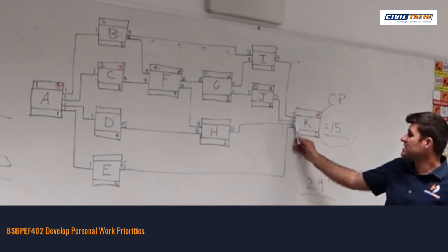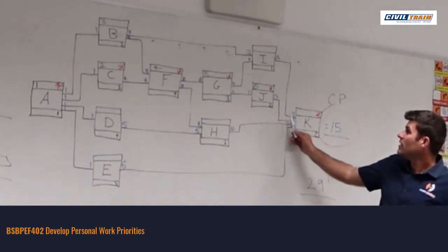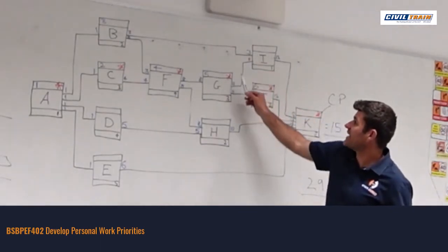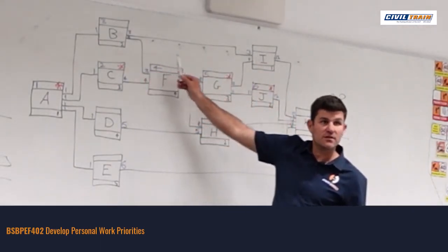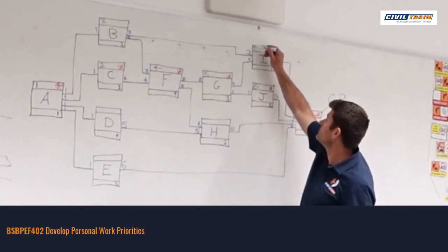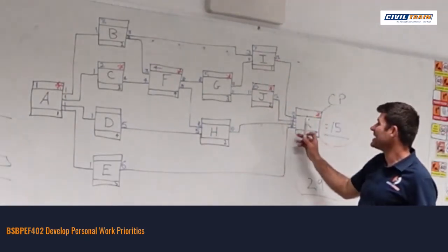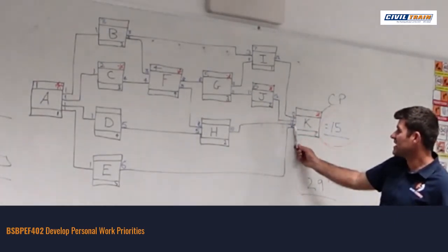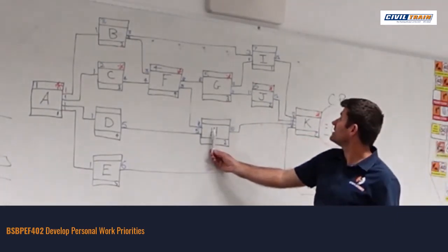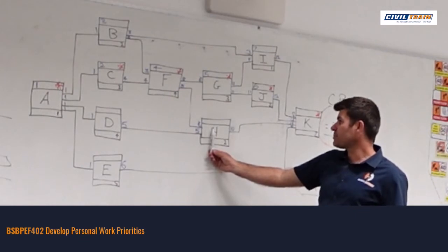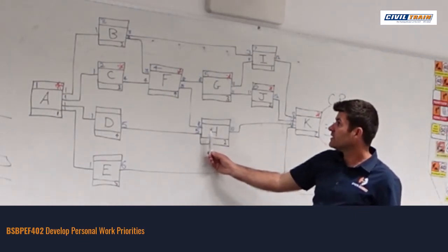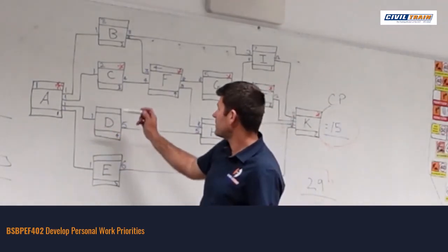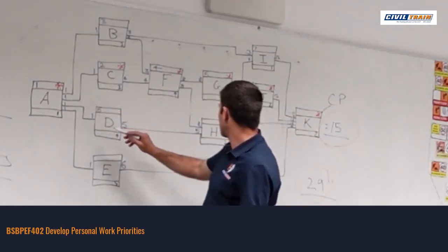So I follow the next biggest number back, which is 12. I check. I want to make that 7. All the other connections coming out are already numbered. So I can make that 7. I want to make K 8. I can't. Follow the next biggest number back out, which is 10. I want to make H number 8. Anything stopping H? Not F. Come back. D and A. So make that 8. Then I can make that 9.